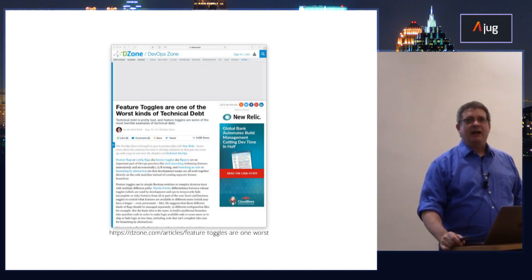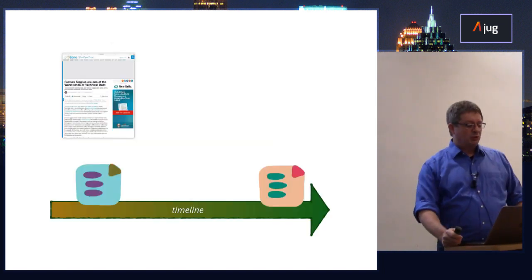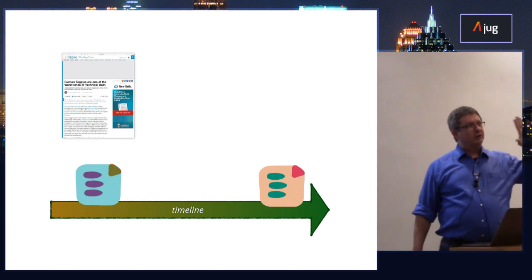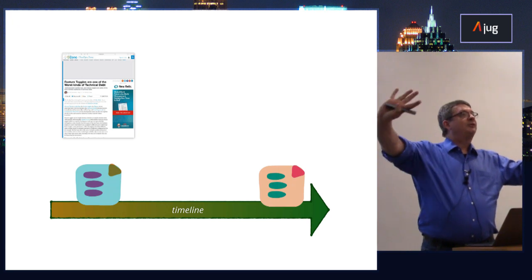So they're basically saying we added a lot of technical debt to our code base, and then we got really mad that there was so much technical debt in our code base. It's like, well, yeah, that will probably happen. So one best practice we implement all the time is, as soon as you play a story card that includes a feature toggle, insert a downstream story card that says remove this feature toggle.